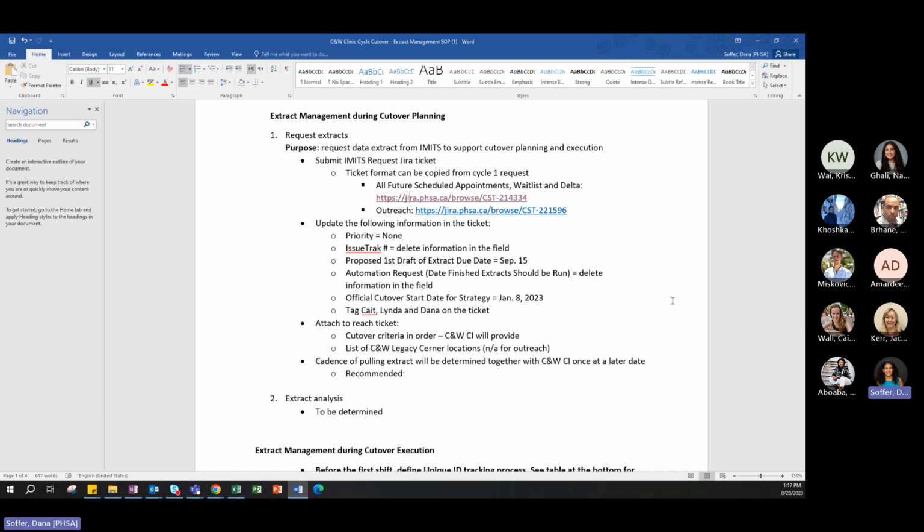We've also found that the order of the columns that we originally asked for with the criteria wasn't supportive enough of our cutover execution. Essentially, we had to change the order just so this could be a little bit easier for the clerks, and a little bit faster, to be honest, to do cutover. So we couldn't change it when we started cutover. This was a lesson learned for us.